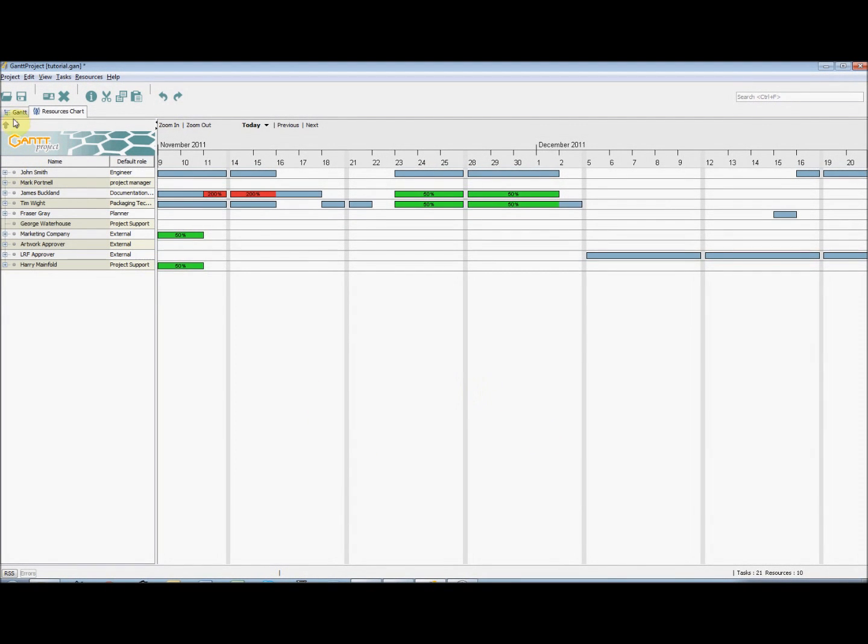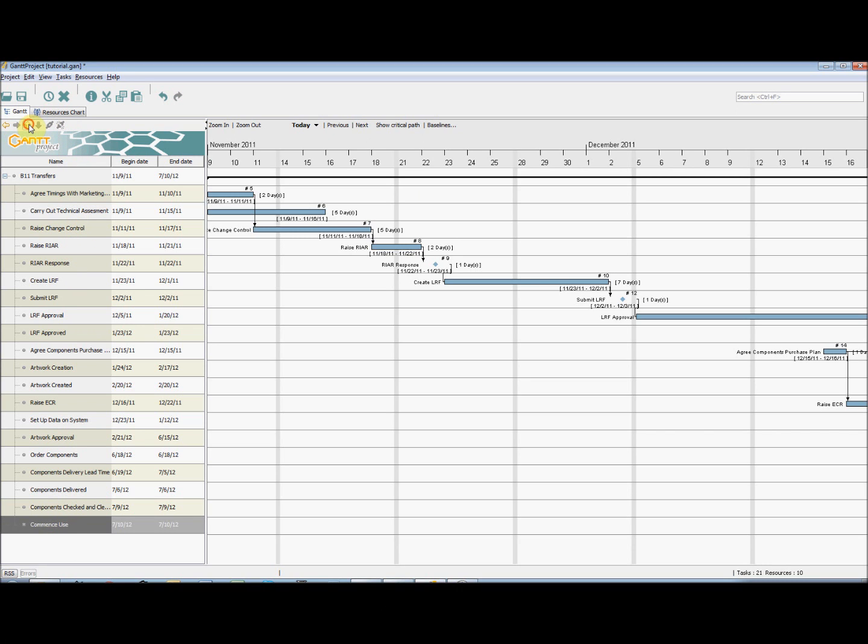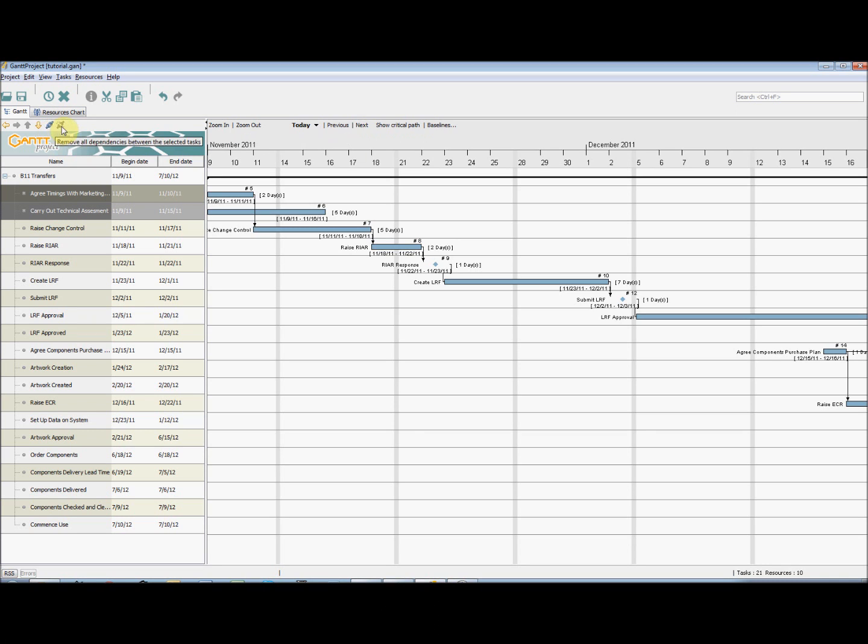If we go back to the Gantt tab, we can indent sub-tasks of tasks using the arrows, as well as moving tasks up or down. If we select two tasks by holding down the control button and clicking the tasks, we can add or remove dependencies.